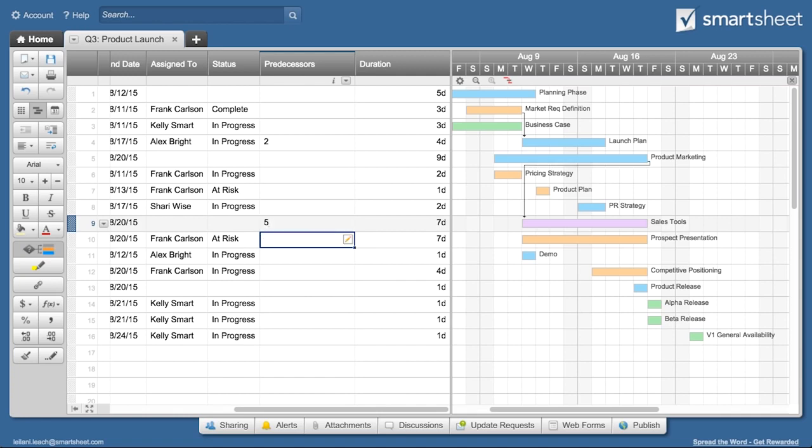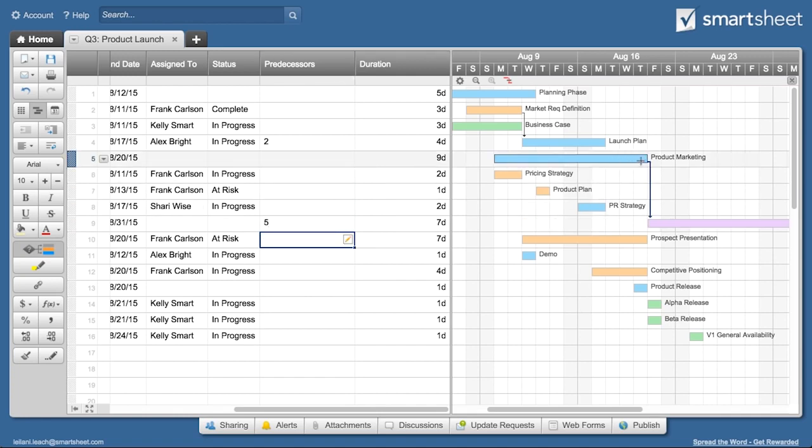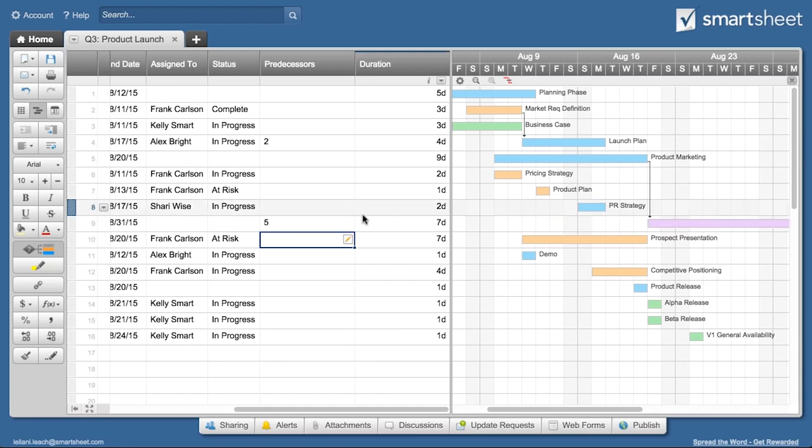The dependent task's start date is set to begin one workday after the predecessor task's finish date. This is a finish-to-start dependency.